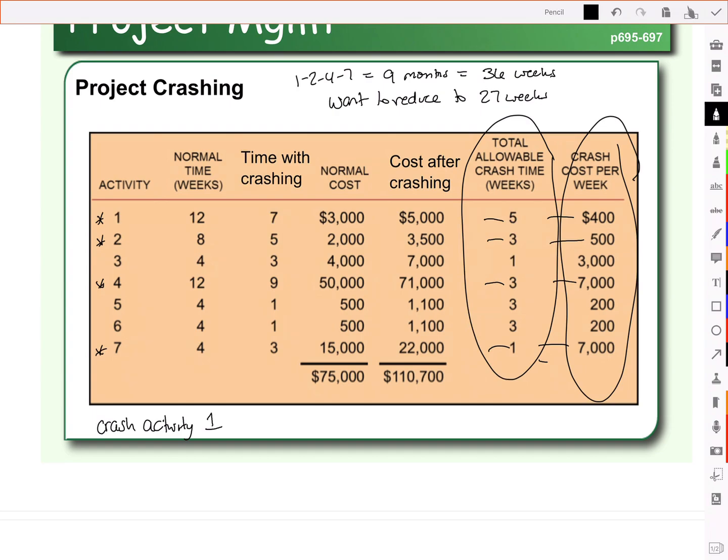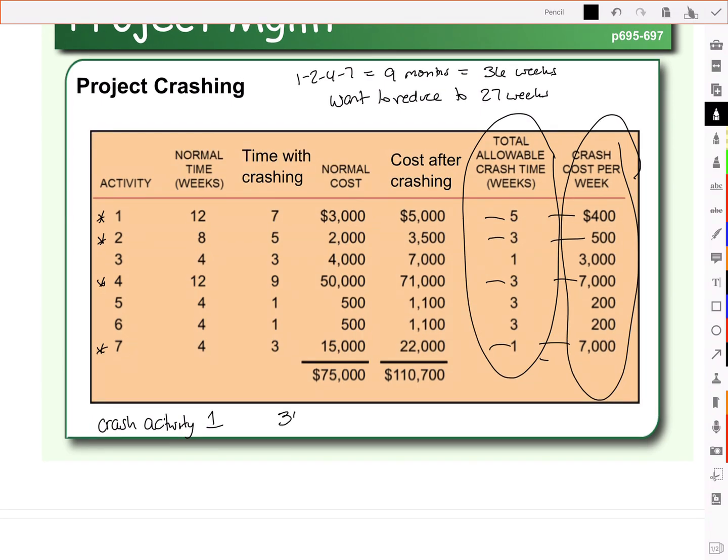So we focus on activity 1, and we can crash up to 5 weeks. So we can go from 36 weeks to 31 weeks, and the cost will be $400 per week to speed it up. So 400 times the 5, 2,000 bucks. Does that get us to 27 weeks? No, we're still short. We're now just at 31. So we need to get down to 27.